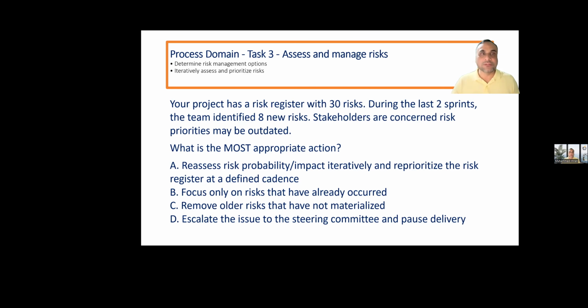You need to understand this while preparing the risk management plan, because the process is that you need to set the strategy, and strategies are set in management plans. In the risk management plan, we define what will be considered a risk and the stakeholder appetite: averse, neutral, and seekers. Averse: limited to none. Neutral: they will take risk if there is an opportunity. Seekers: they will take risk for the business objectives, not thinking of positive or negative. For them, business is more important.